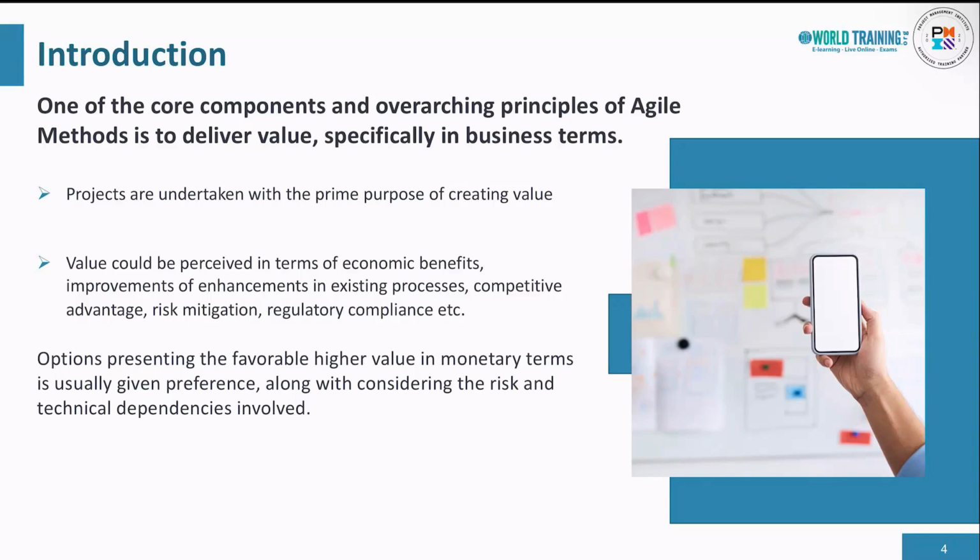One of the key ways agile teams try to maximize value is by delivering value early. This means they aim to deliver the highest value first, as soon as possible. There are some important reasons for this approach. To maximize success, we have to try to deliver as many high-value components as we can before things change or go sideways.